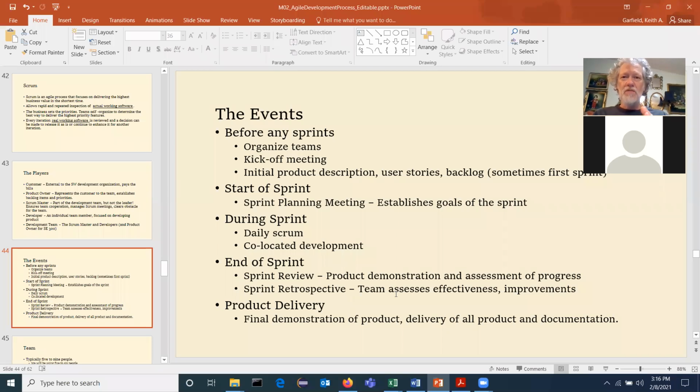And you don't try to solve the problem in the meeting. You just acknowledge the problem exists. And then outside of the meeting, you and another person try to work through it. And if you've got a dedicated Scrum Master who's also not a developer, it falls on that person's shoulders to do the follow-up and clearing. But usually it's something like, oh, I needed access to this class. I needed access to this data that someone else is in charge of. And they'll say, oh, I have that over here. I'll put it on the shared website or whatever. Okay, problem's done. And then you actually have to do development work, obviously, during the sprint.